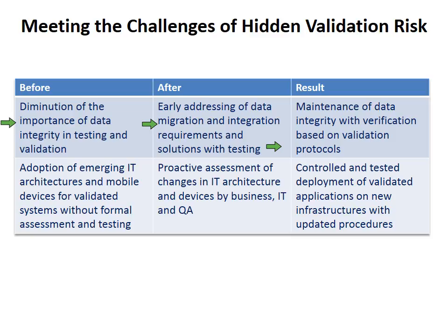Are we going to keep our legacy system where it is? Are we going to move it to the new one? Are we going to archive it? What are the retention period issues? How are we going to integrate it with our internal systems? All those questions should be right up front, even before you know the full scope of what the clinical trial system is going to do, because there's a lot of variation within those. But one thing for sure is you're going to have to figure out what to do with your data and how you're going to manage it against your legacy processes.